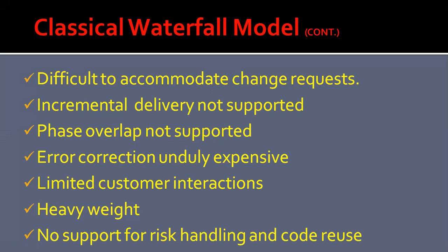Therefore, accommodating even a small change request after the development activities are underway not only requires overhauling the plan, but also the artifacts that have already been developed. So once the requirements have been frozen, the waterfall model provides no scope for any modification to the requirements.